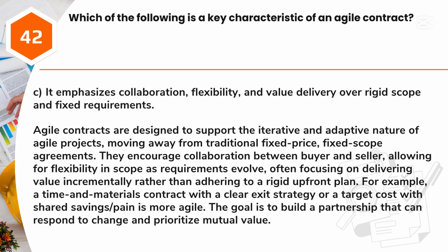For example, a time and materials contract with a clear exit strategy or a target cost with shared savings/pain is more agile. The goal is to build a partnership that can respond to change and prioritize mutual value.